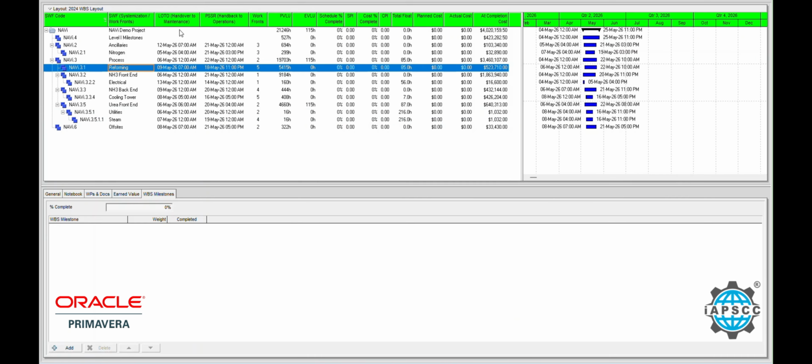In this example, we'll look at the reformer system. You can see here the lockout-tagout date, handover to maintenance, and the pre-startup safety review date, handback to operations. Note, the reason we do not use critical path on STO events is due to the multiple systems being scheduled by priority, complexity, availability, density, execution strategy, and so on. We'll use critical systems and workfronts instead.